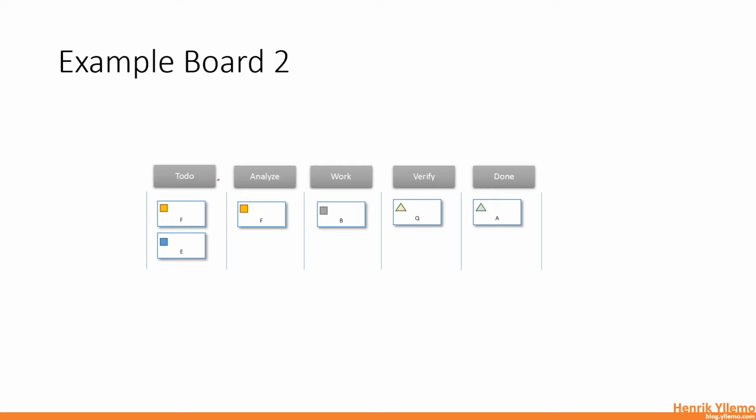If you have a really long board, let's say 20 or so columns, it's really hard to see, and it's really hard to have the correct amount of work in progress limitations as well. So we have this third board. Another thing you can do instead of having lots of different columns is to have columns within a column, so to say. So in this example, we have doing and done as 2 different types of columns within the column.